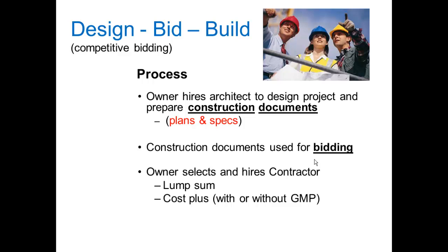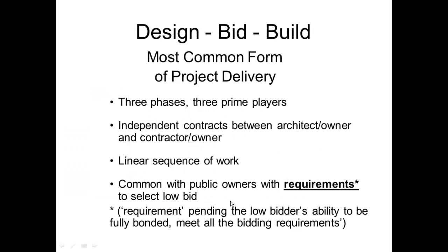So once you get used to it, it's not bad, but there is a tremendous amount of paperwork that more and more we're trying to convert digitally into some form that doesn't take up quite as much space. You basically need a warehouse to house most of this stuff. In this design, bid, build process, the construction documents used for bidding are created by the architect, and the contractors will bid this as the low bidder. Owner selects and hires the contractor based on lump sum cost or cost plus. Oops, sorry.